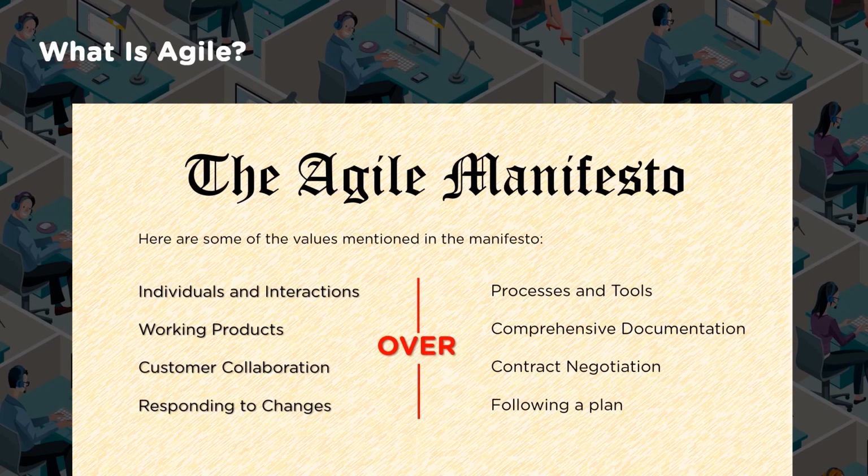As I create the working pieces, I'm also getting the feedback because I'm interacting with the users, the consumers, the end users. So I get the feedback, I keep making the changes quickly, and the documentation is updated accordingly. The small pieces of documentation which happen with those small working modules are consolidated over a period of time. By the time the project ends, you have a comprehensive documentation. So it saves a lot of time. So documentation is important, but the way we accomplish the documentation is one by one, not in one go.